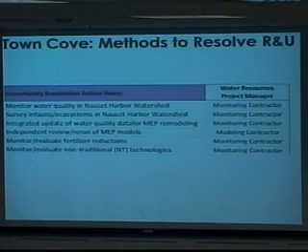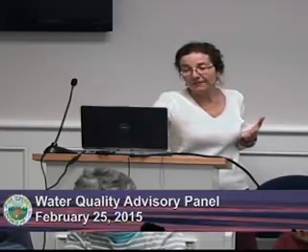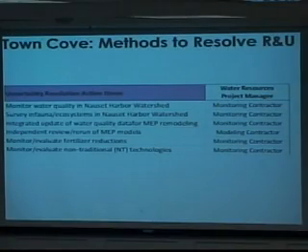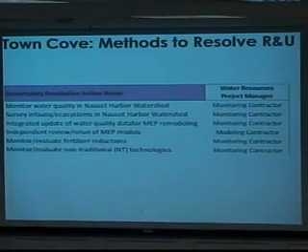So we've got uncertainty resolution action items. And how I'm going to do this presentation is I'm going to talk through the first column of the Gantt chart so that we can talk about the elements. Because we've got to build this Gantt chart. The first way we're going to build it is understand what elements I've included. And if I've missed some, like maybe we need to put monitor and evaluate traditional technologies as another specific item. Then we're going to talk about the timeline for dealing with all of these items. And then finally, we're going to put some arrows to show how one item feeds into the next.